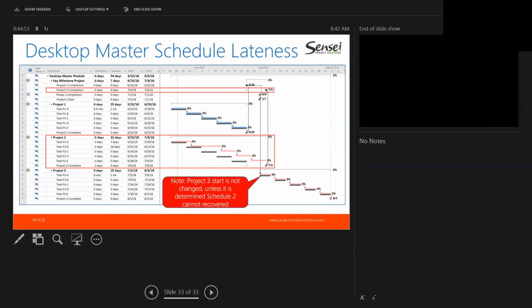And you can see currently that, let's bring this more into focus, the start date of project 3 is way back at the original planning date, and it's not currently linked to the key milestone project at all. So if I select my key milestone task, and I use my control select to get to the first task in the project, I then go back to my task and I create link. I now have connected my start of project 3 to the phase 1 indirectly, to the project 3 start date milestone, which is connected to the phase 1 milestone. So this is kind of option 1, where I can connect it straight to a receiving milestone.